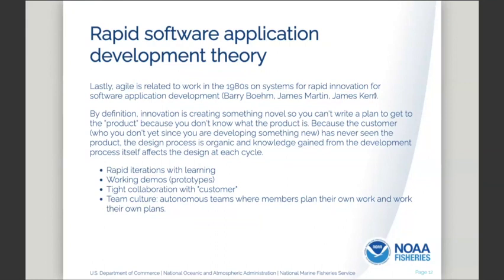And they have this situation where they create something, a user interface, and they show it to the person. The person interacts with it. They see what they like and they don't like. But the user changes by interacting with the interface. The user becomes used to certain things. So the user has changed. As the user is exposed to the product, the end user keeps changing. So there is literally no way you can come up with a plan ahead of time, because your end user changes when they are exposed to your product.